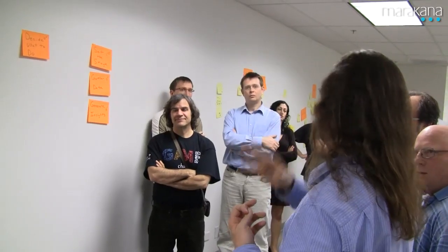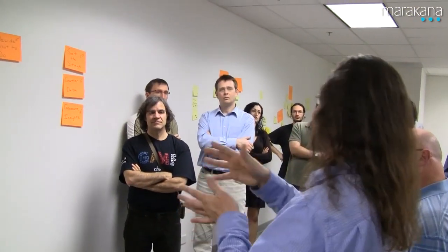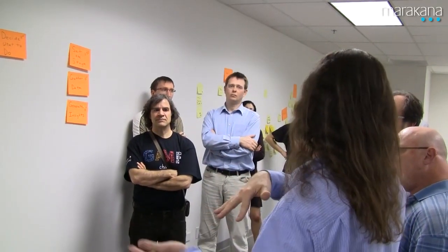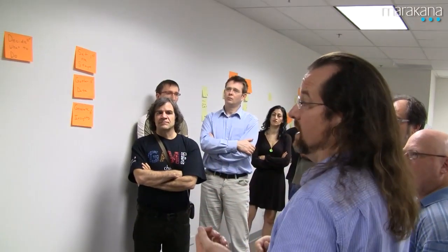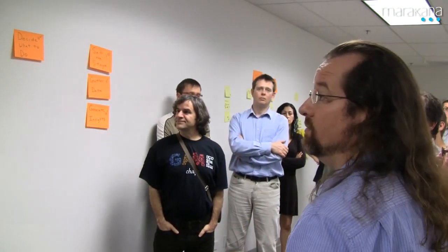And in fact, a fair number of teams will run their experiments for the length of a sprint and build a little bit of time at the beginning of the next retrospective to decide, do we keep doing last retrospective's experiment or not? So I can imagine saying, hey, at our next sprint retrospective, we'll do a thumbs up, thumbs down kind of vote about it. We'll have a little discussion. We'll decide if we want to keep doing this. Yeah, I like it.